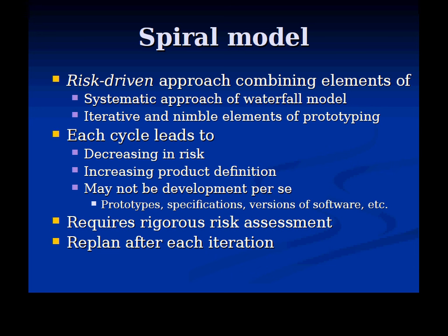And during that time, the host company, the client, would get impatient and their needs would change. So they'd say, well, look, you're taking a full year, you could do this as well, you can do that. And it turned into this thing where they could never really deliver the full project because they're always in churn with new requests. And they ended up not having favorable customer reviews at all because the client was perpetually unhappy and therefore perpetually piling on new requests.